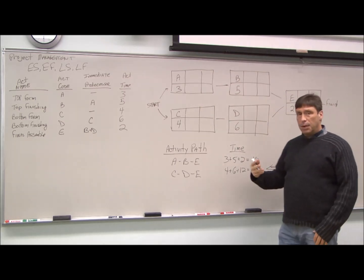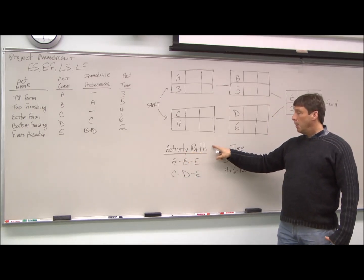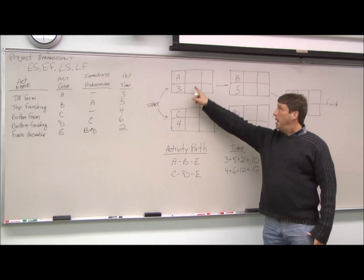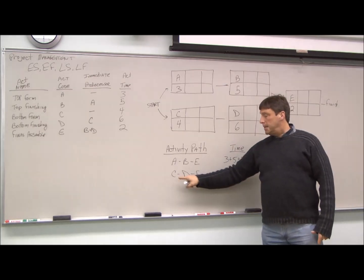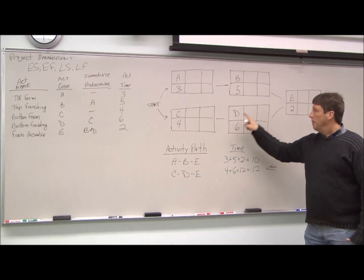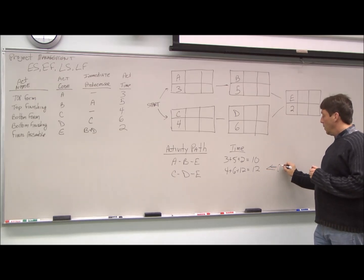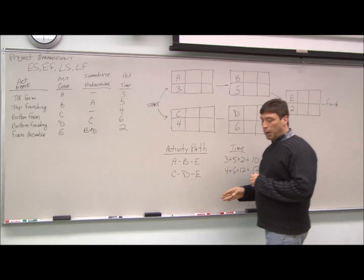From that, we've seen previously with PERT, we can chart our activity path and see how long it takes. So my path ABE is going to take ten weeks, my path CDE is going to take twelve weeks. So CDE will be my critical path here, and the critical path is twelve weeks.